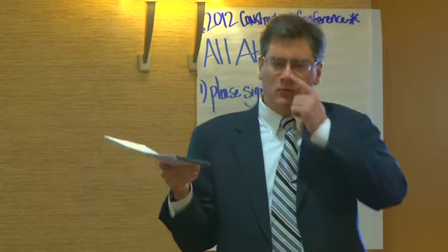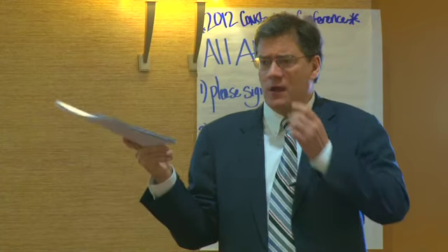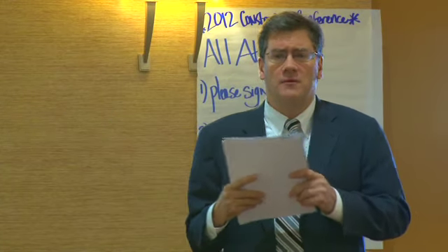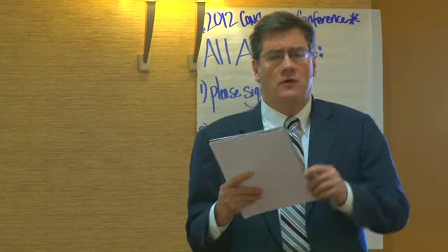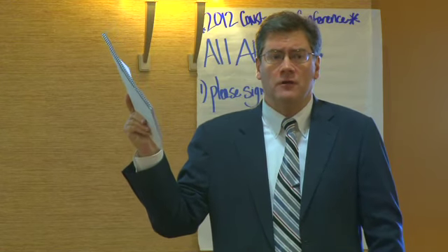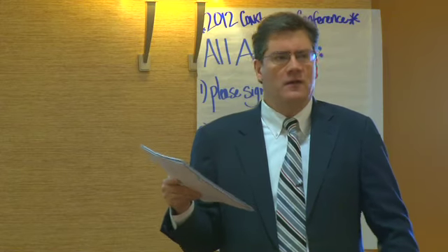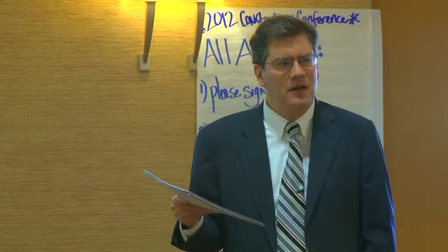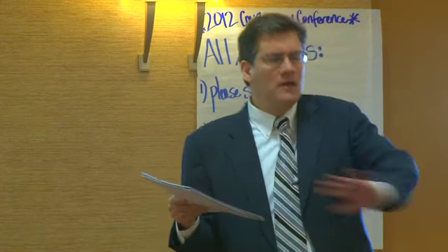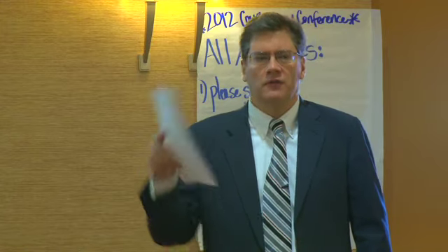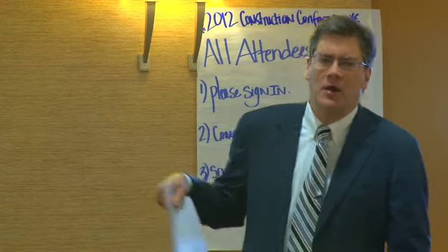All right? So you rattle the stop notice and you rattle the lien claim warnings at the same time, and you say to the project owner, the general contractor, we can sue on these stop notice rights, and we're going to unless we're paid. Well, 3 months comes and the project owner says, I just don't have the money yet from the lender on this. You can let your stop notice rights expire because you still have your lien claim rights in your back pocket.